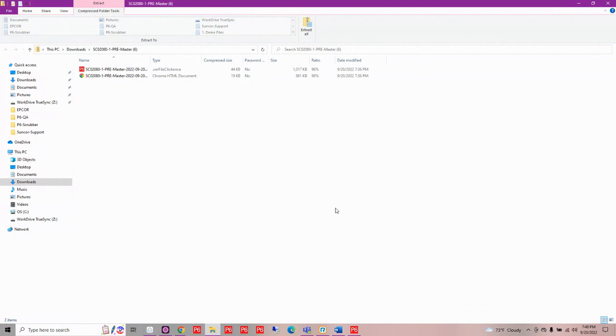So let me just go ahead, I've downloaded it, and you can see that I got two files. I have my clean file, the one that was scrubbed, and I can tell because it's appended by the date and time. And I've also been given a copy of that HTML report that we just looked at. So if I were giving feedback to someone, perhaps on their schedule, and I had run the scrubber on it, I could take this report, copy and paste pieces of it, or share the whole report, so that I could give feedback to that person who sent me that XER file or that XML file.